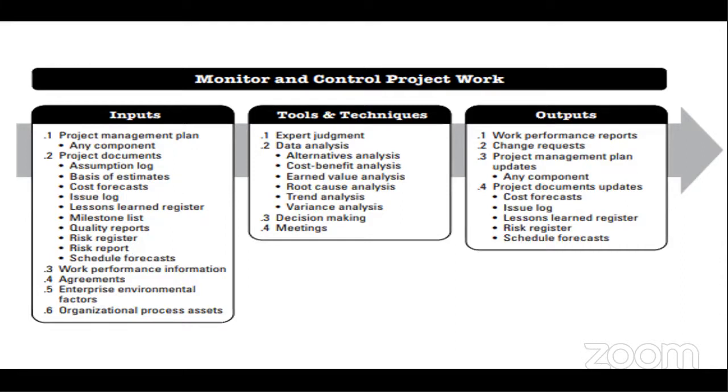Someone asked a question in the first class, and the question was that, can we reduce cost and still have quality? All right. Now, when you now begin to do your alternative identification, although you already have an estimated cost for that quality, when you begin to do alternative identification, you will now begin to find other options that, though the resource you're using is not of less quality, there could be an option available to you to now get the resource at a cheaper rate with the same quality.